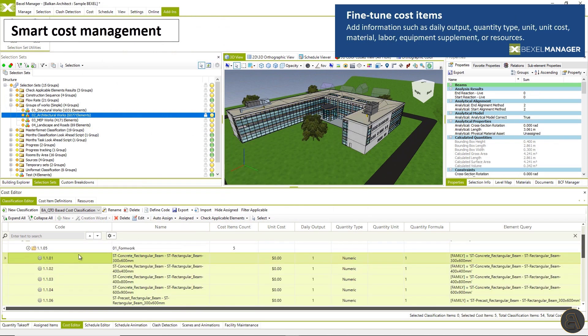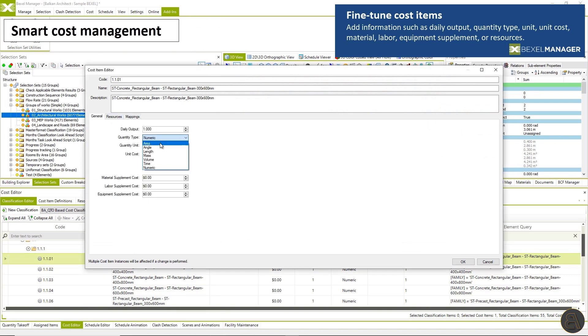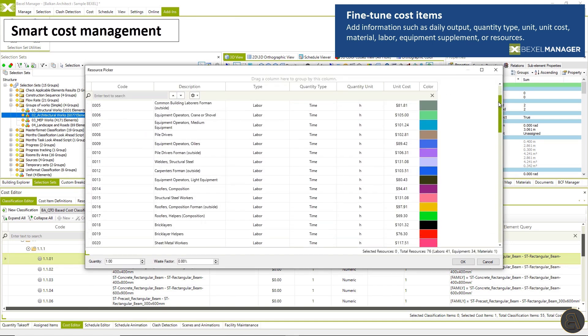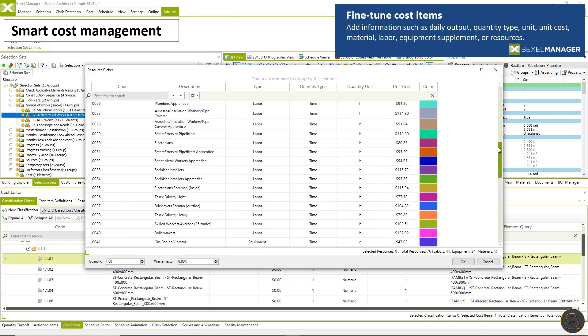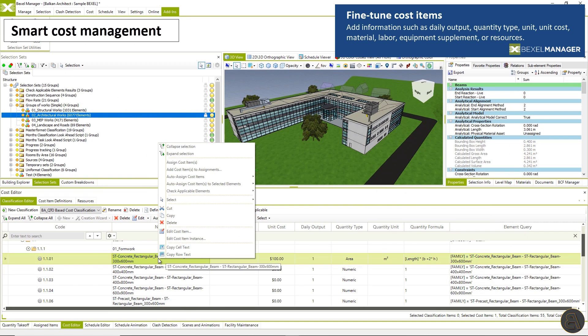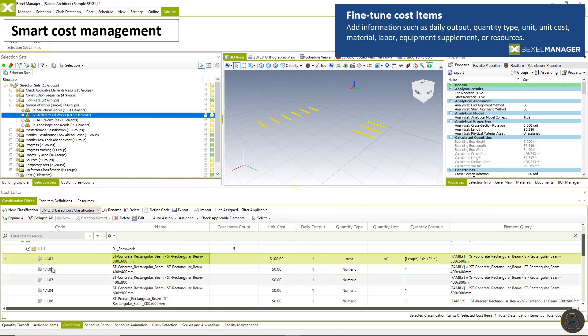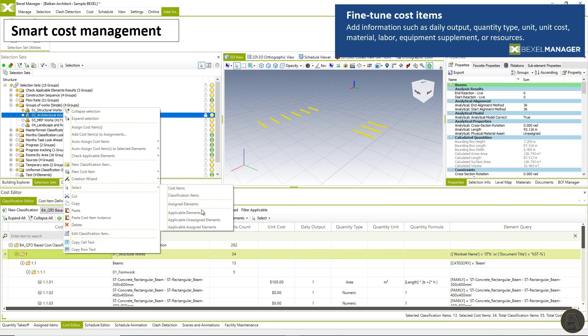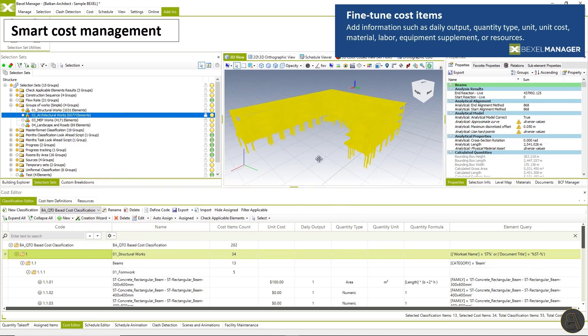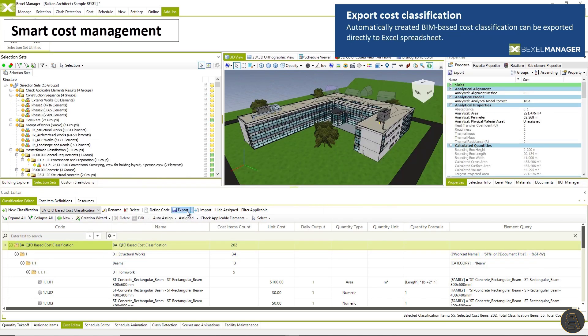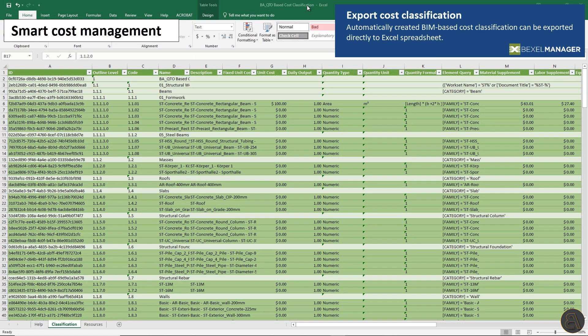Fine tune cost items directly in the Bexel manager by adding or changing information options such as daily output, quantity type, unit, unit cost, material, labor, equipment, supplement.